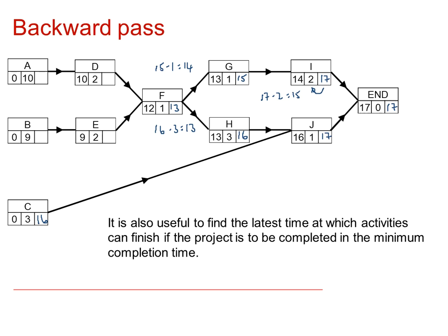Now the reason for the smaller is that if that finishes at 13, H can start at 13, and away we go. If it finished at 14, G would be okay because we'd have here 14 plus 1 is 15. So G we'd get away with, but H would be delayed because if this here was 14, then we'd have 14 plus 3 for H is 17. So H is going to be delayed. So you must go for the smaller of the numbers, the 13.